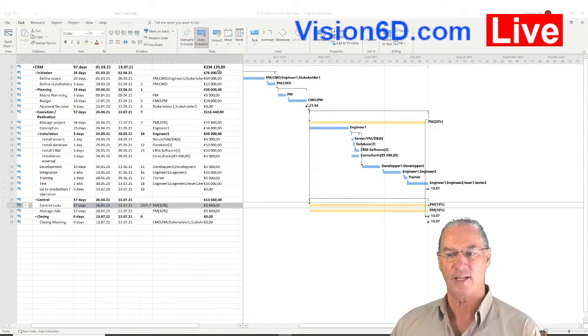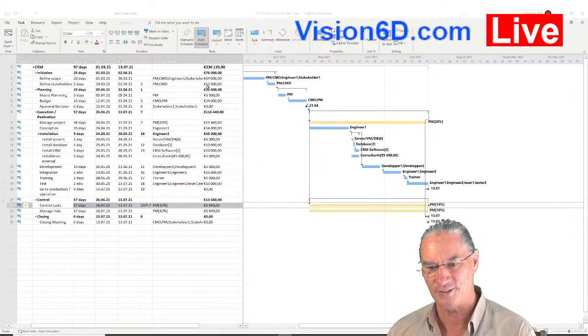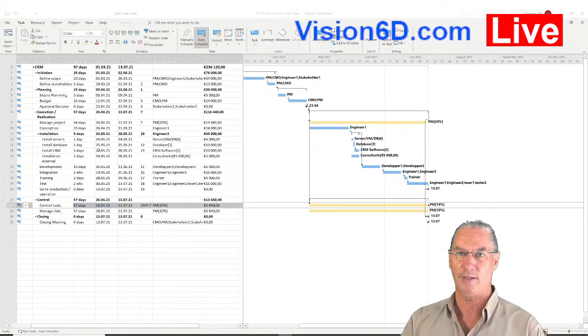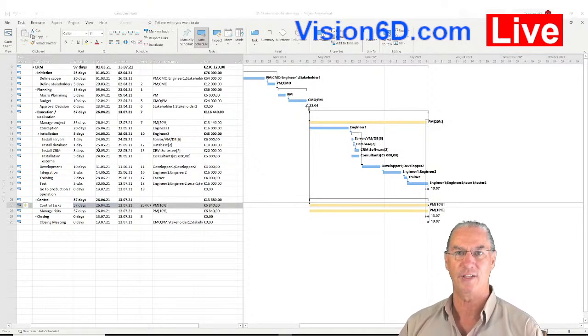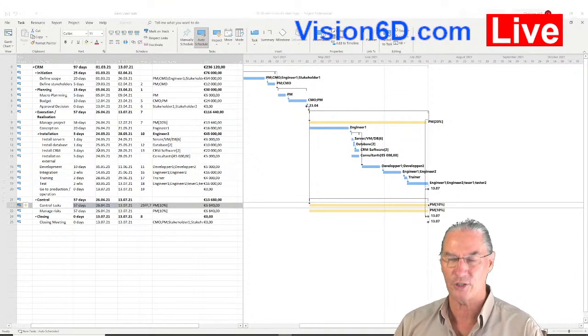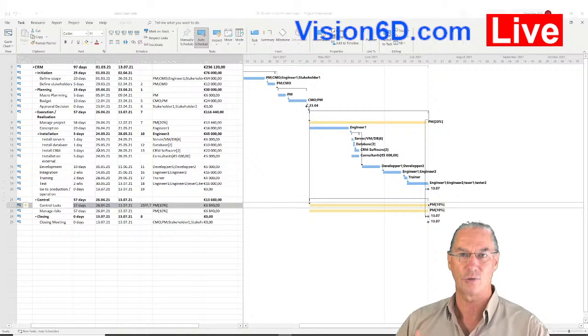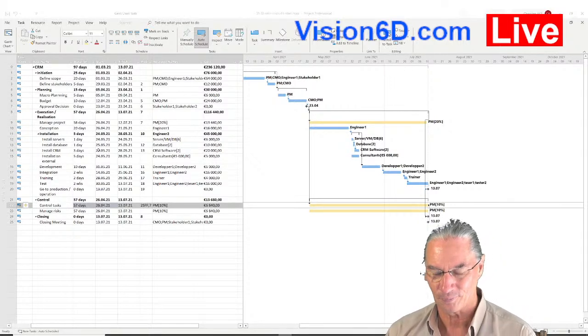It was a project that was much more expensive than the one we just calculated here, because we had a huge phase of data migration that I didn't show here. The cost of the total project was around 3 million euros. So the project management function was a function that was full-time on the project.